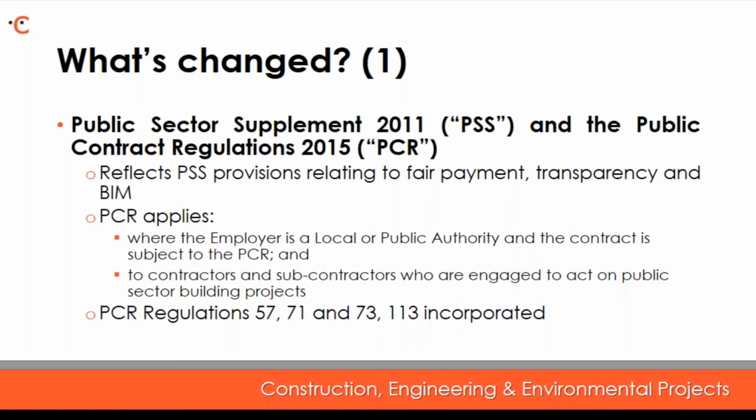There's also an obligation on contracting authorities to ensure that the subcontractors abide by the conditions and that the terms are passed down the supply chain. So it's important to note that where a public contract doesn't provide for these requirements, they are deemed to be included, and this means that the obligations cannot be contracted out of.